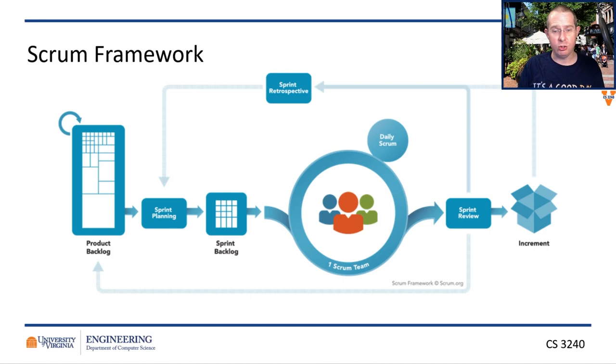During the stand-up meeting, the daily scrum meeting, as it's called here in this loop, you review where we are on all of these tasks. How is everyone doing? What are the blockers? Do we need to reassign tasks? Okay, great. Go team, go. And you break up, you go do your stuff, and you keep going around and around until the sprint is done.